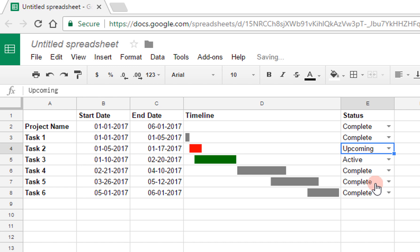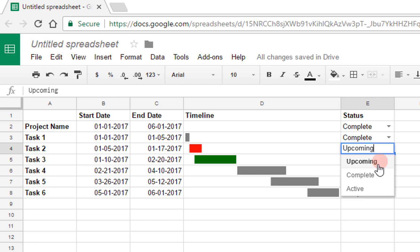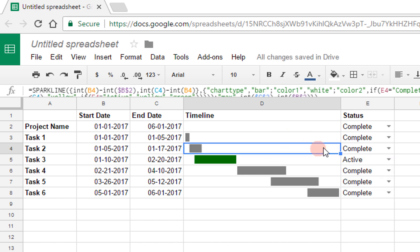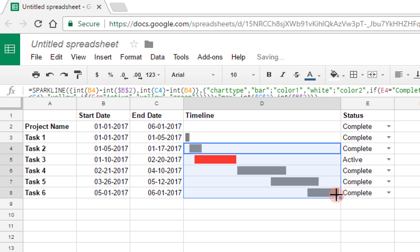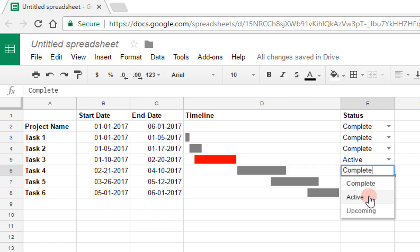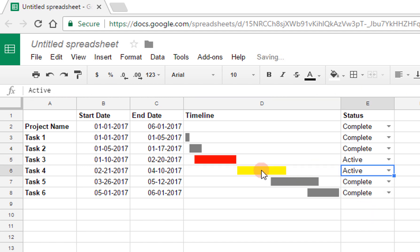If I make it upcoming, that's also no good, it's already past that end date. So let me mark that as complete, and let's propagate this property through all of our cells, and see if things work as we expect. So this one is active, and we're past that date, so that's going to be red. Let's make this one active as well, and currently, today is March 29th, so we are within this window, and so it turns yellow.